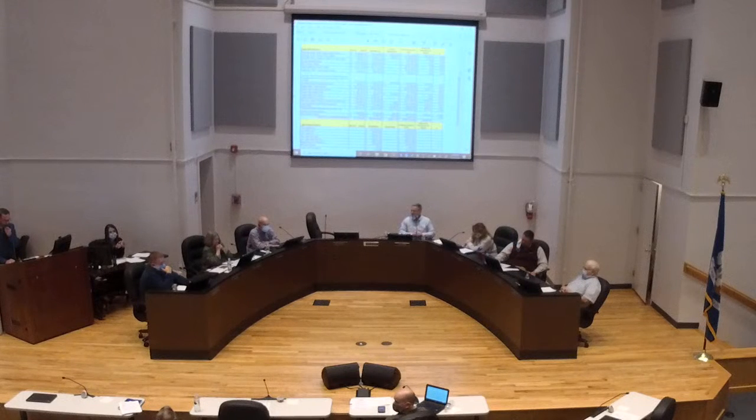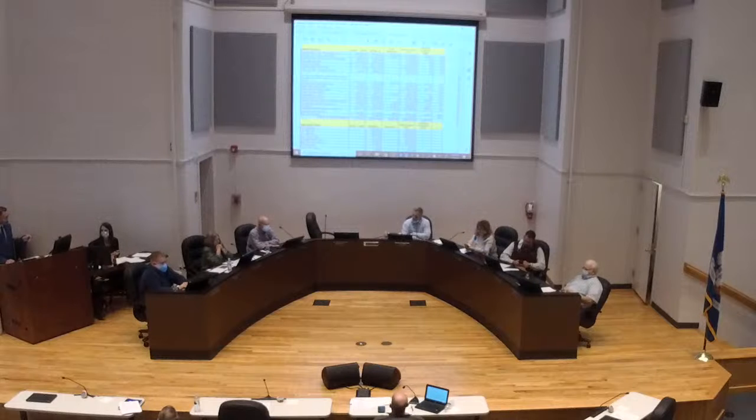Mr. Norwood has a comment. I was just going to say that we have from time to time had needs identified and brought to you, and some of them came up rather suddenly, like a couple of scoreboards needing replacement, where we just advised you that if there was no objection, we would use the funds from that school. What the board has typically done on occasion is exactly what we're talking about now, which is reallocate funds from completed projects. That's where some of the money from Airline came from. It came from some of the completed projects, and it is now listed under Airline. I would suggest that you've given us enough direction to know that, to the greatest extent possible, we want to take the funds from the schools if it's available. But obviously, it isn't completely available to Airline, so there have to be some adjustments made. If you leave that to Mr. Davenport's discretion, he's not going to take it all out of one account.